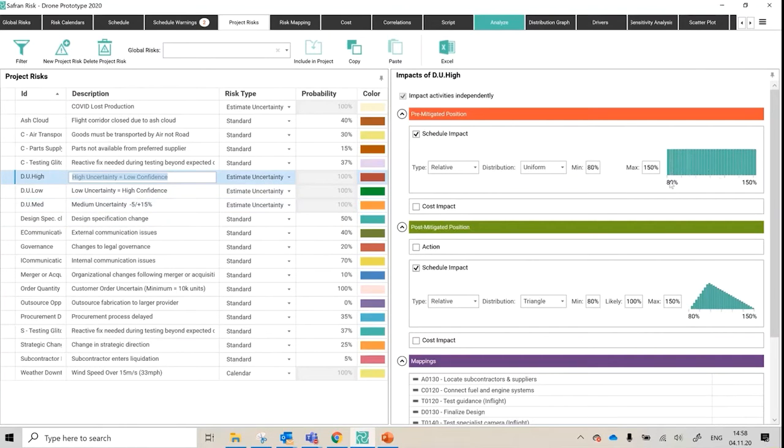So maybe this is for an activity sometime in the future, like 4 years into the future. We have no idea. We're not arrogant enough to know what the most likely is going to be. So it's in the schedule as part of the deterministic program, but we're going to plus or minus that by 20%. Could be delivered sooner, but maybe 50% overrun potential. So that's broadly what I've got going on in the background here, just for your information.